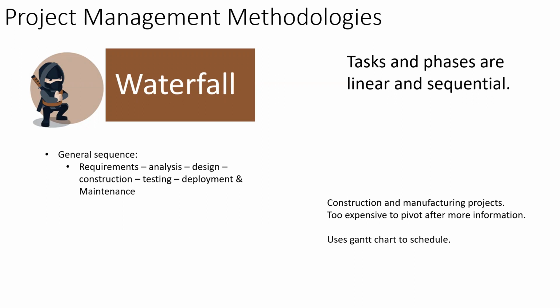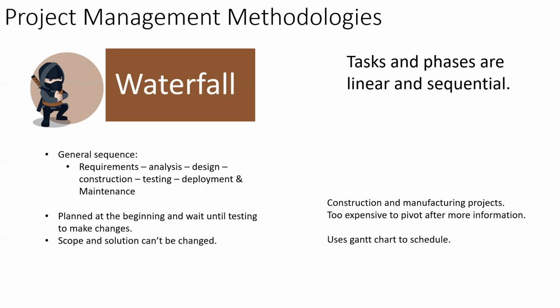You can't go requirements, analysis, design, construct, and then back to changing your requirements. You have to keep going in that same direction. If you think about building a house, waterfall would be great for that, because you know what you need to achieve. You've got your requirements, you've got your design of your home, you've laid the foundation. You can't now go back and change the design of the home. So waterfall is very useful when you know what your solution is, you know your scope, you know what you need to achieve, and you can plan it all from the beginning.